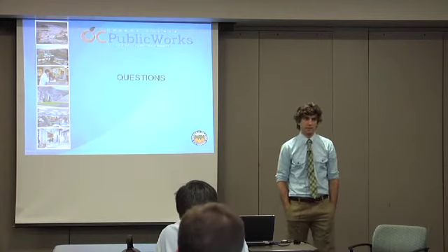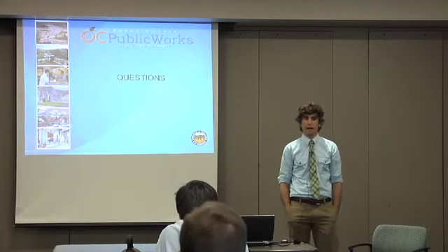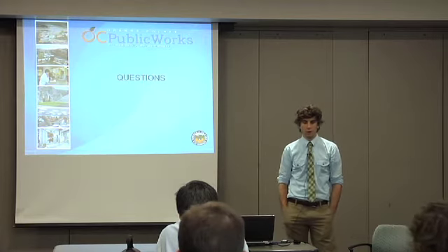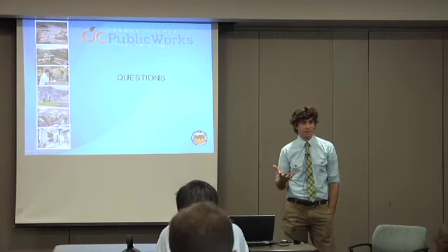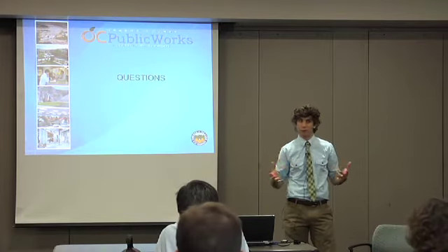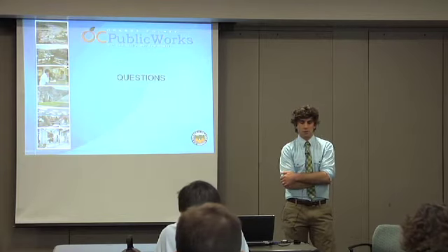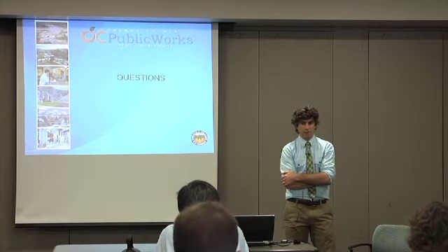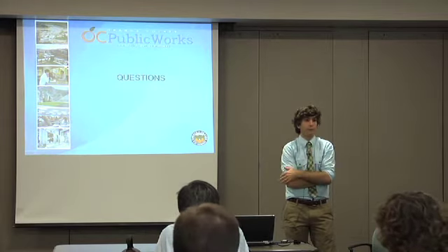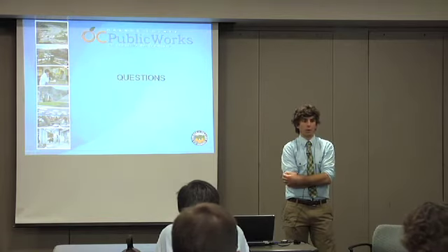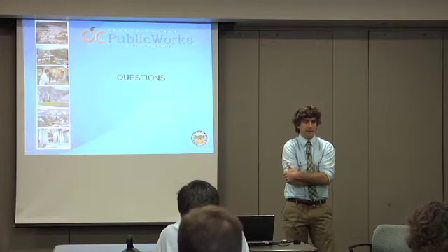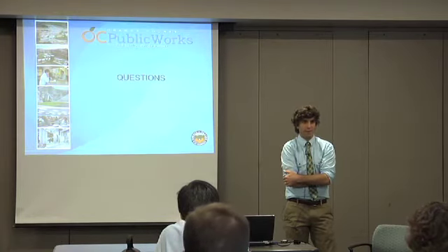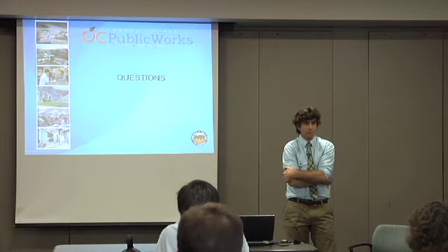Absolutely, you need to check the sizing calculations. As part of their package, what they should be pulling out for you, and what you should ask them to pull out for you, are the key design parameters that are interesting to you, which is the volume of the system, how much storage volume does it provide, cubic feet, acre feet, and then the geotech. And for example, if we were working with an infiltration system, you would also need to ask them, well, what is the infiltration rate of this system? What have you done to substantiate that? How are you adjusting that rate for a factor of safety to account for the fact that this system will clog over time?